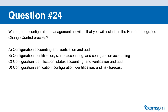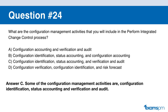Question number twenty-four. What are the configuration management activities included in the perform integrated change control process? A: configuration accounting and verification and audit. B: configuration identification, status accounting, and configuration accounting. C: configuration identification, status accounting, and verification and audit. D: configuration verification, configuration identification, and risk forecast. If you said C, you are correct. The configuration management activities include configuration identification, status accounting, and verification and audit.